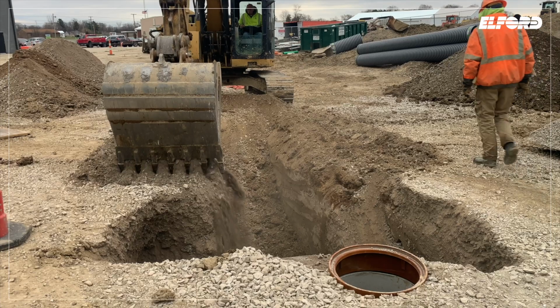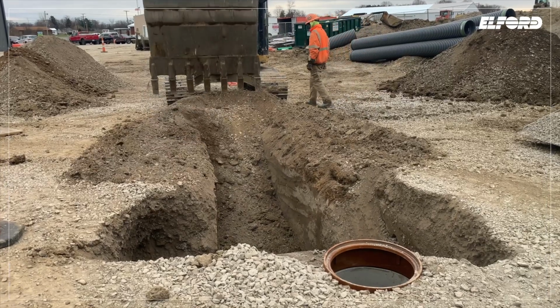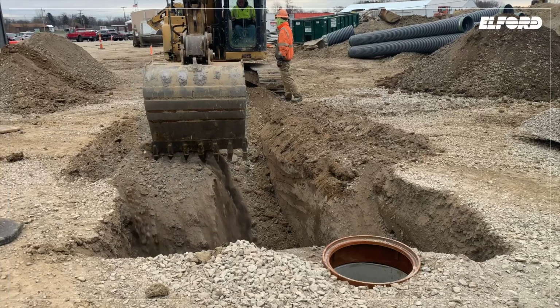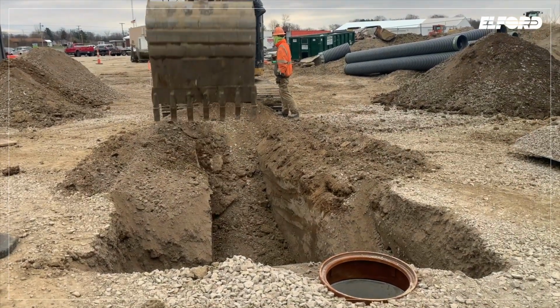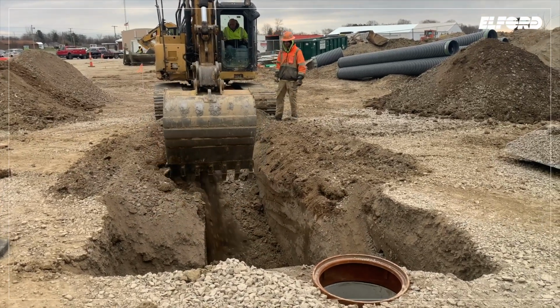The subcontractor's competent person, as defined by OSHA, shall directly supervise all excavation trenching work performed on site. The competent person is responsible for completing daily inspection of the excavation, adjacent areas, and protective systems for evidence of changed conditions that could result in a cave-in. The inspections shall occur at the start of each shift and throughout the shift as needed.